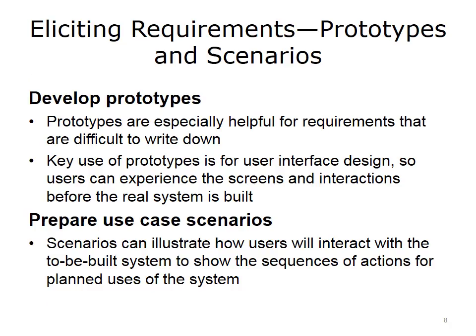Other methods to define requirements at the beginning of the project include developing prototypes and preparing scenarios. Prototypes can be very valuable. Consult references for prototyping. Prototypes are often good candidates to use for requirements that are difficult to specify using words alone. A prototype is not intended to be the real system. It is intended, instead, to illustrate some features and elicit feedback from users.